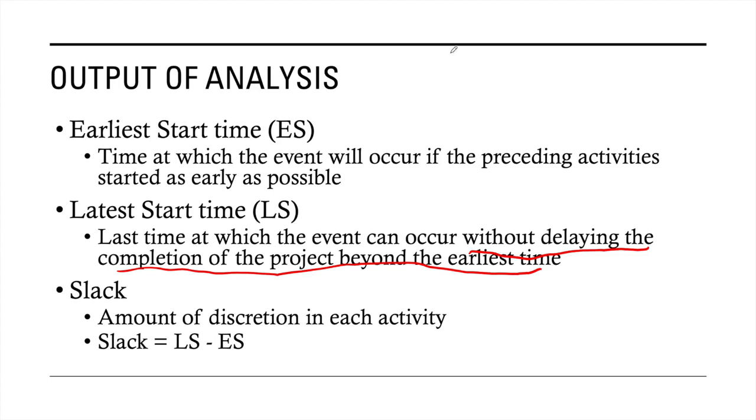There are technically two more outputs that are related to your earliest start time and latest start time. That's your earliest finish time and the latest finish time. However, essentially, EF is just ES plus the activity duration.